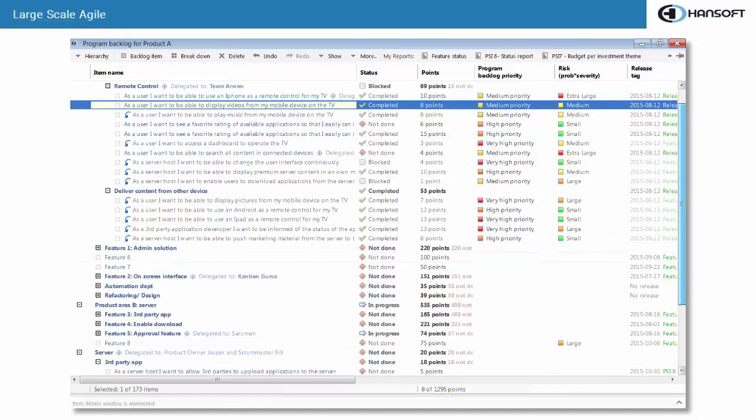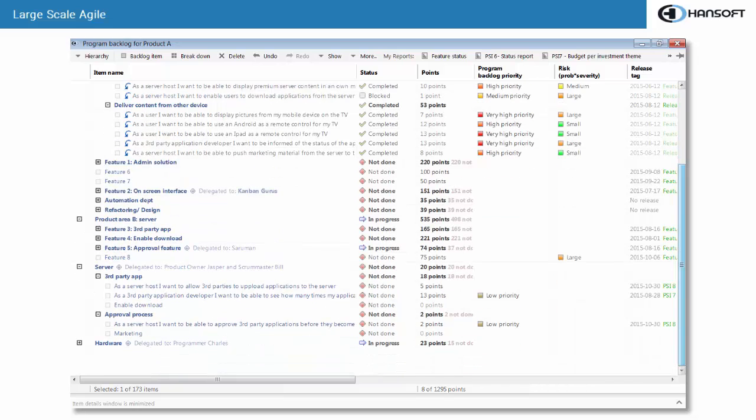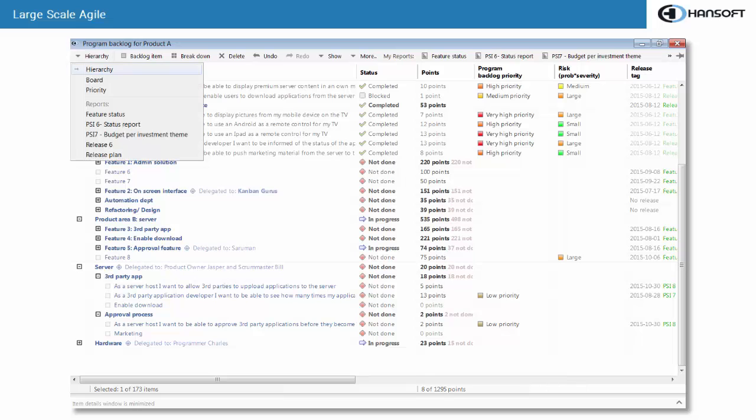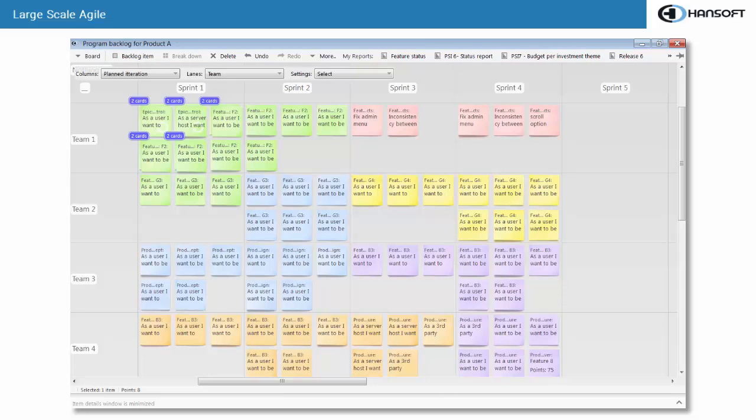Regardless of how these developers organize themselves, they're always going to end up in a situation where there's a lot of dependencies between teams. And this calls for some joint release planning, where they not only plan what content the release will contain, but also what feature is going to be worked on when and by what team. So the color here indicates what feature it is. This setup is very Scaled Agile Framework inspired, for those of you who want to learn more.